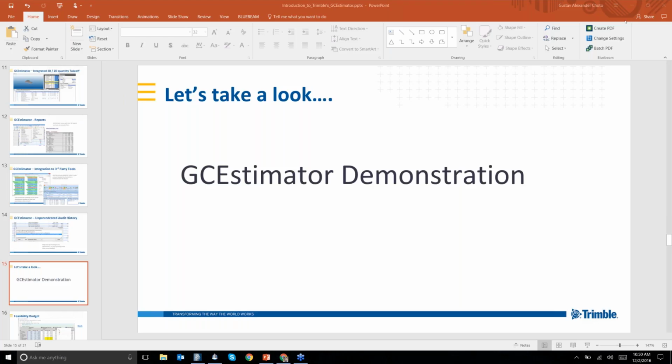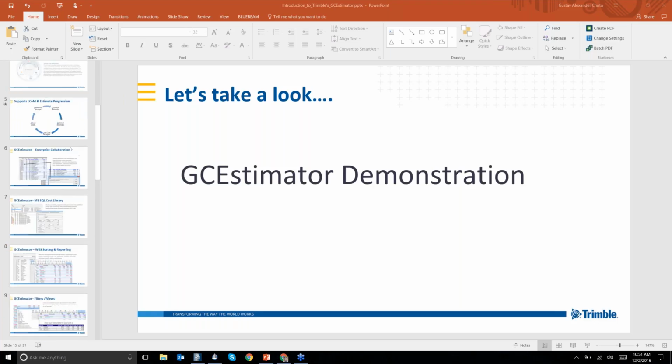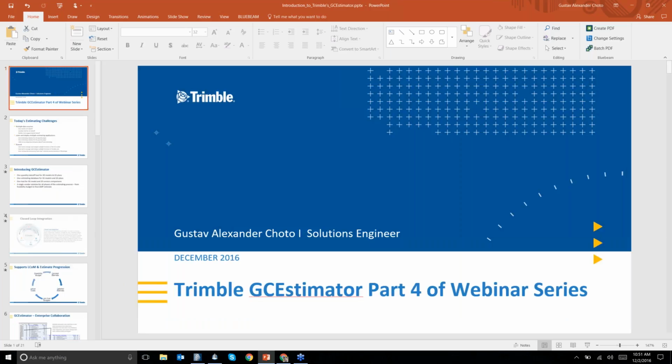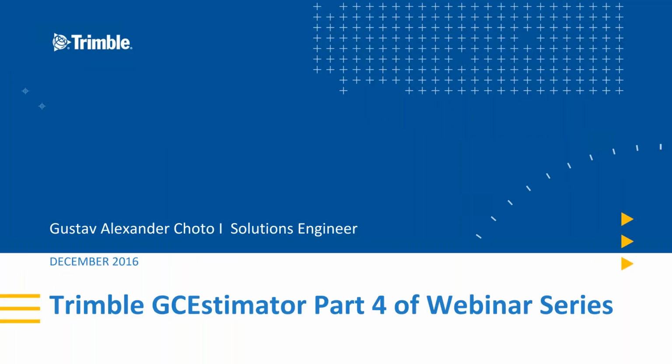how, once we're iterating on a design, say we've gotten quantities from one of our original designs, and we get another design from our designer, we get new quantities, and we can lock those elements into the line items in the estimate since they have already been identified. If they have changed, we can view the differences and see what is out of sync. The power there is knowing that you are estimating the right quantities and giving your client the correct estimate, reducing risk and increasing accuracy and efficiency.